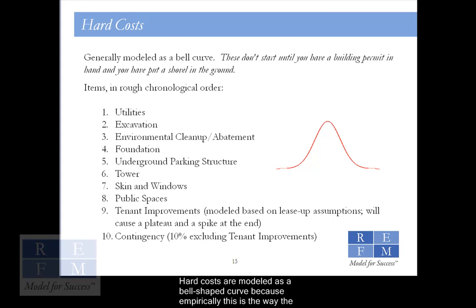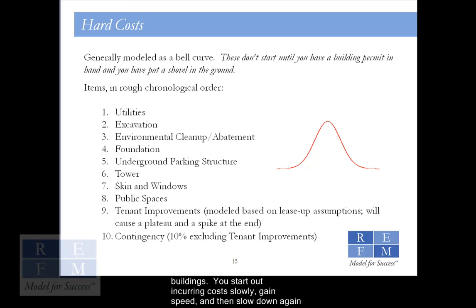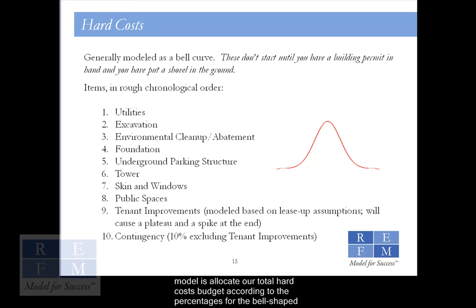Hard costs are modeled as a bell-shaped curve because, empirically, this is the way the construction budget is spent over the course of the construction schedule for buildings. You start out incurring costs slowly, gain speed, and then slow down again at the end. As a result, what we do in our model is allocate our total hard cost budget according to the percentages for the bell-shaped curve that matches our construction schedule duration.